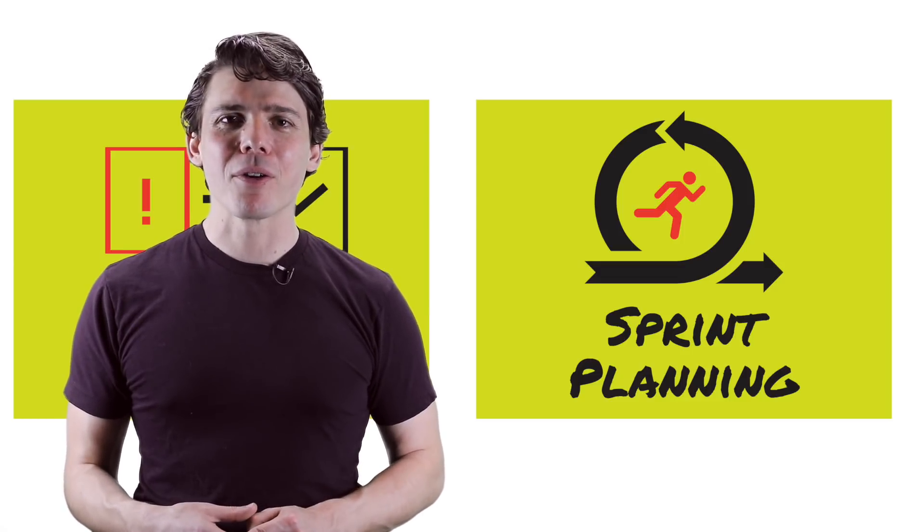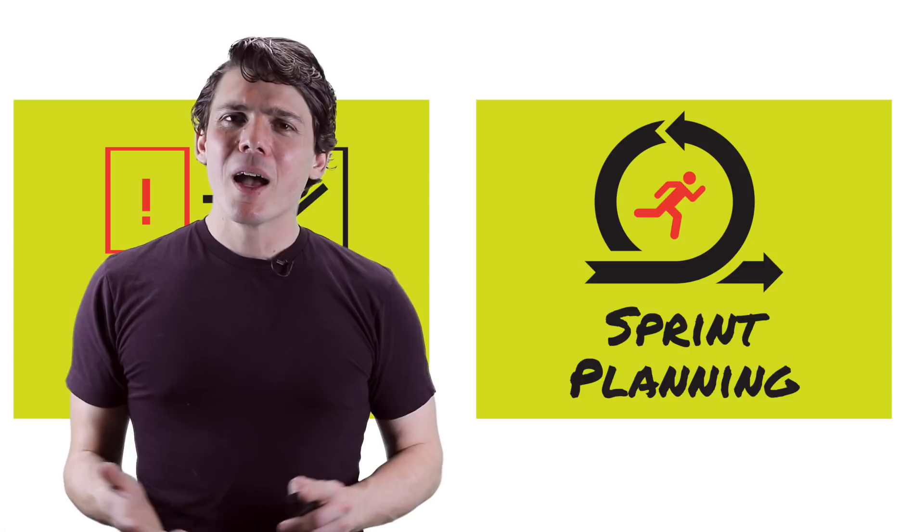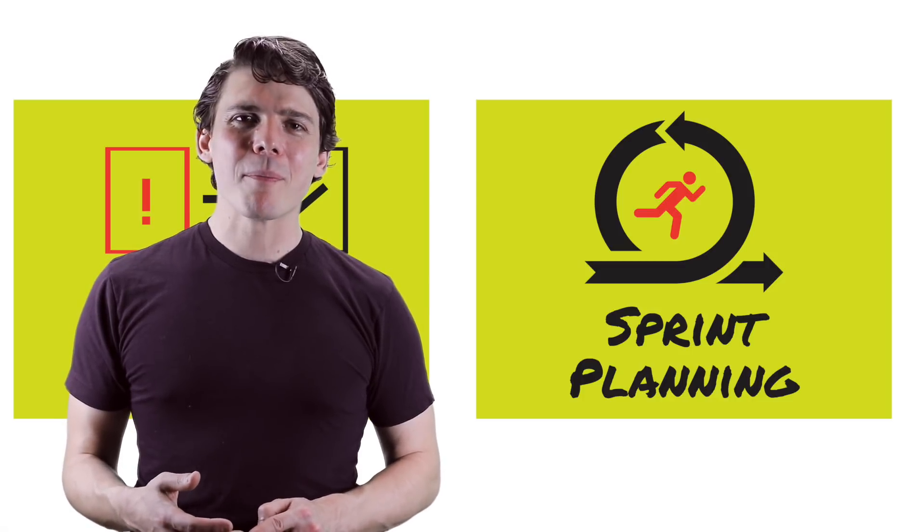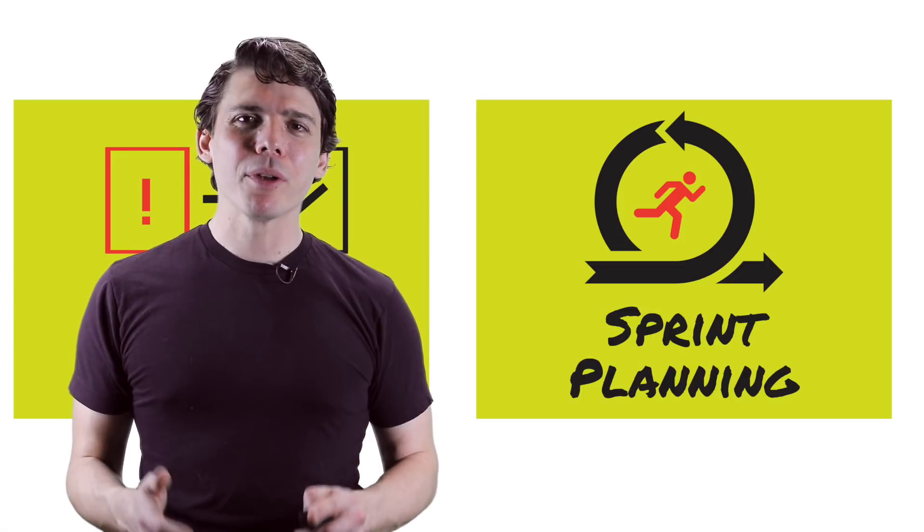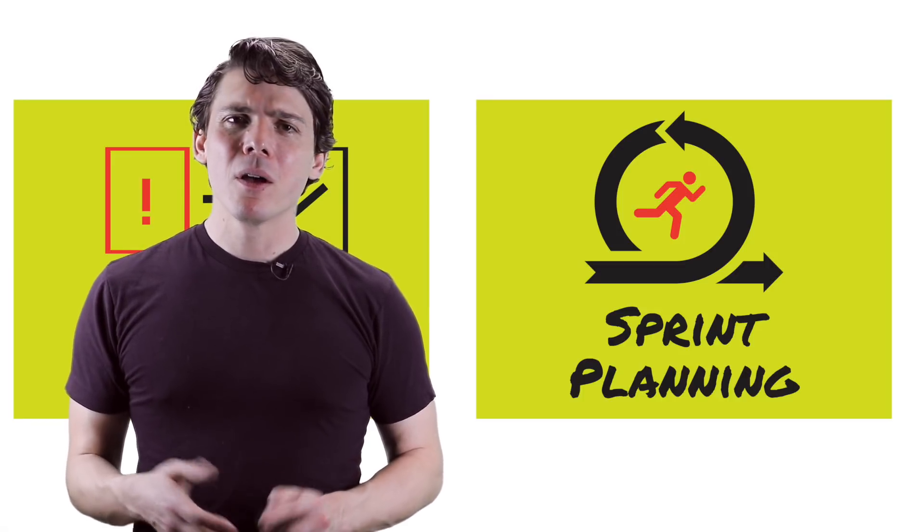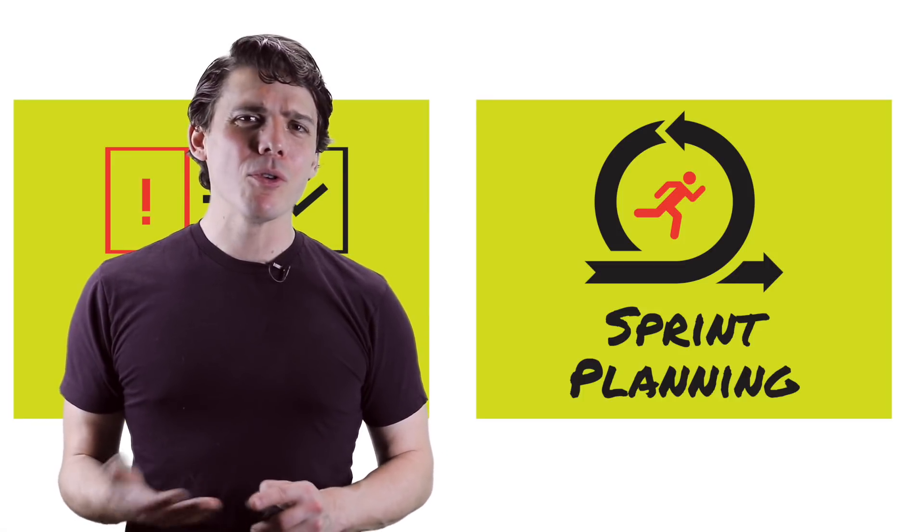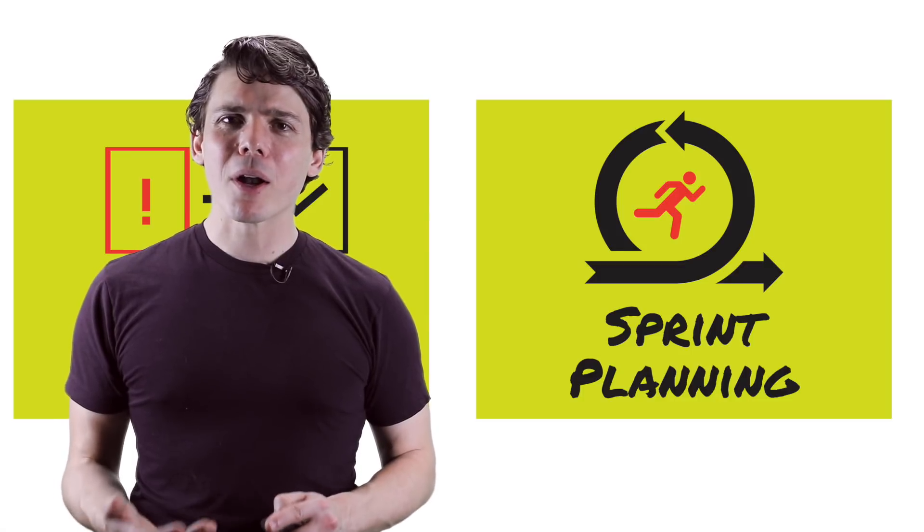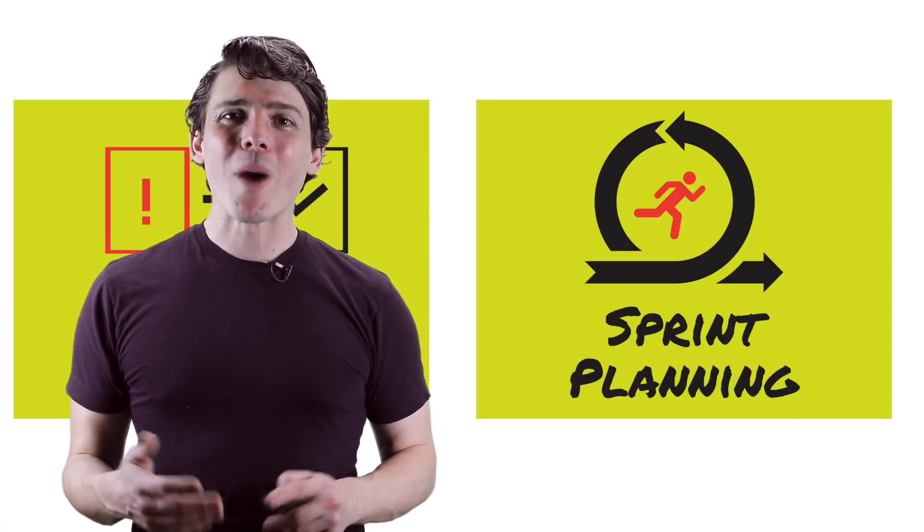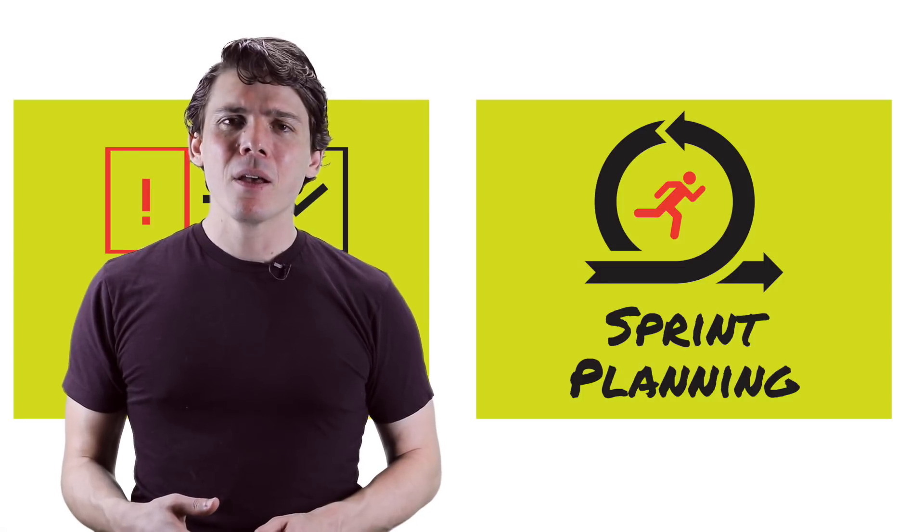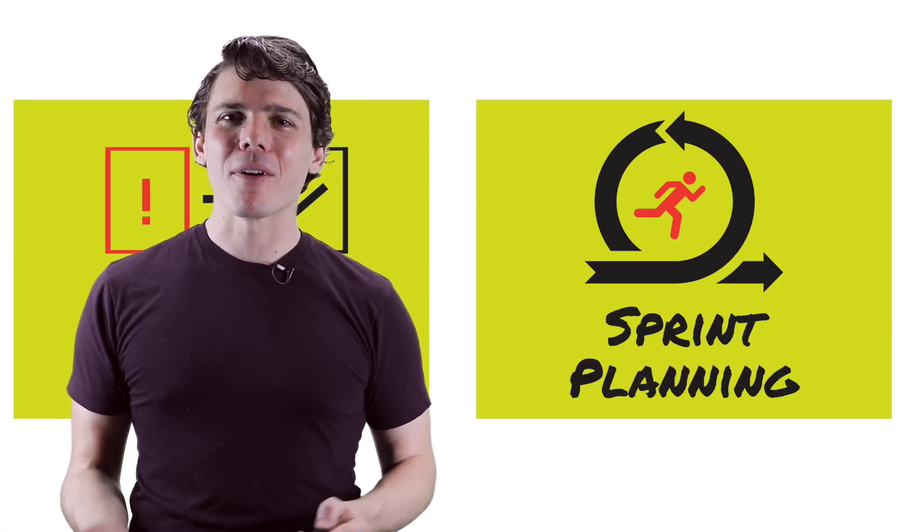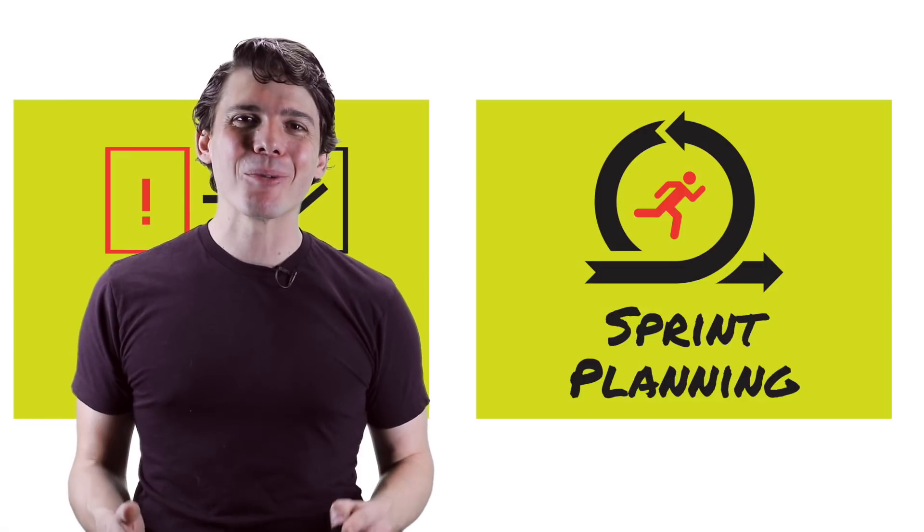Teams often overcommit, either due to pressure from the product owner or a naive optimism. The Scrum Master will discourage this with effective coaching. Having determined a reasonable sprint backlog, the development team decides together how we'll complete the work this sprint. Most teams decompose user stories, bugs, and other product backlog items into more granular tasks, generally taking a day or less.